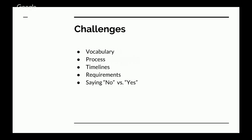And so throughout the project, we found that at key points, people would forget what we were calling block, and they would fall back on what they called the 3-up content module. And we'd have to scratch our heads, review the documents, look back on it. It's not really a stop the project, stop the product development, we don't know what's going on, but more of a, this takes up time. If you are not sure and you have to ask questions, that all soaks up time, and especially in working with a tight timeline, that's not really a situation where you want to get into.